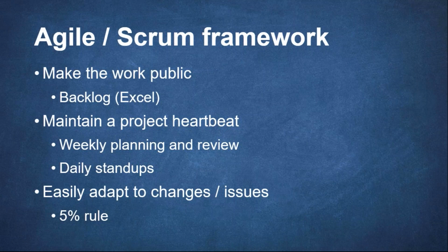There's a rule, I'm not sure where, but I probably read it in some book or saw it on a webinar. It's called the 5% rule. If you address an issue within 5% of the time of it coming up, it's much easier to address than when it's grown for weeks and weeks and it's now a 30, 40% issue.